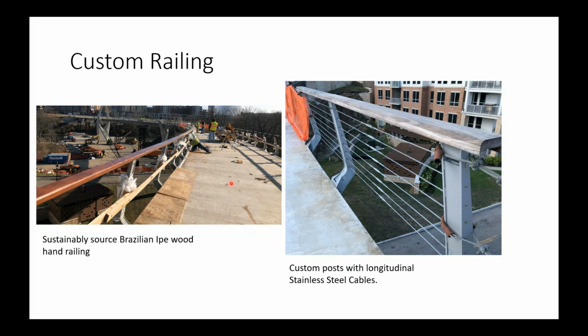It did take a long time to get a sustainable supply of this wood, so it's another long lead item that we identified as such, and made sure that the contractor was looking into getting this material on site early in the process. But I think it came out really nice, and it should be very sustainable with very minimal maintenance. It doesn't require painting or anything, so it should last quite a while.